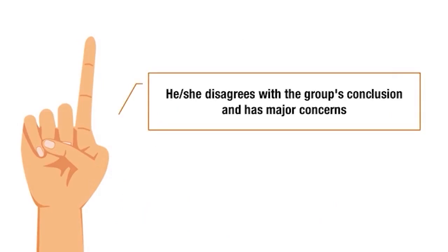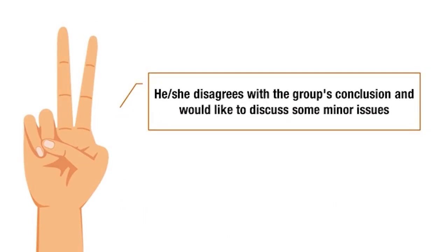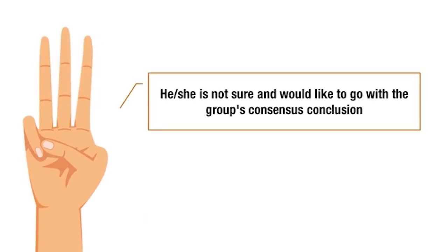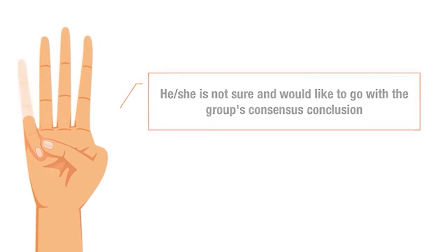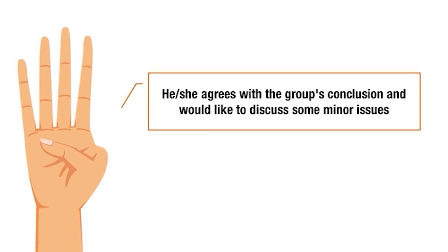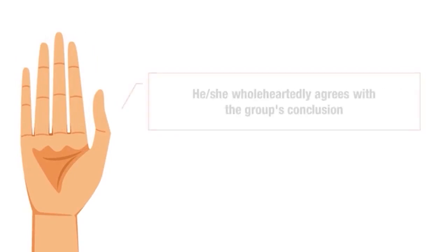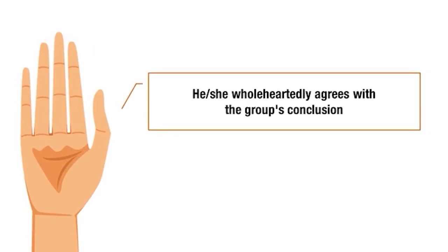Two fingers means disagreement with some minor issues to discuss. Three fingers means the team member is not sure and will go with the group's consensus. Four fingers means agreement but with some minor issues to discuss. Five fingers means wholeheartedly agreeing with the group's conclusion.